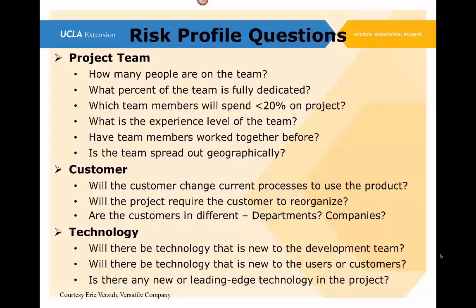may not get them. If I'm supposed to get them in the afternoon, they may be working on something in the morning, and come noon, they can't just leave it. They've got to finish it. I may not see them till 1:30 or 2 o'clock in the afternoon. I may not get my 50% of the time. Likewise in the morning, if I have them mornings and not in the afternoons.